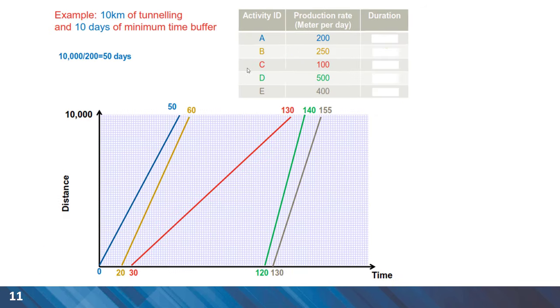Another example that we can look at is a tunneling project with the length of 10 kilometers or 10,000 meters. Here, the production rates are given and we can work out the duration. As an example, for activity A with a production rate of 200 meters per day, we can find the duration of 50 days. For activity B with a higher production rate, the duration will be 40 days and so on. We can calculate the duration for all projects.